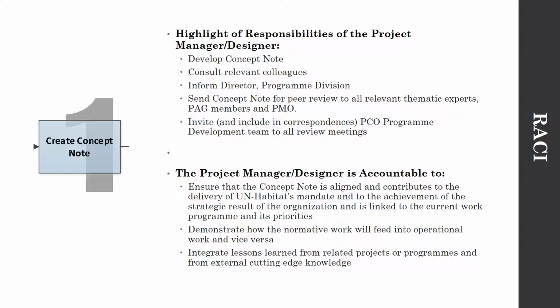Now, in terms of responsibility and accountability, the project manager is the main person in step one. He or she is both responsible and accountable for the step. The project manager develops a concept note, consults relevant colleagues, informs the director of program division, and then sends the concept note for review to all relevant thematic experts, the PAG members, and the PMO.